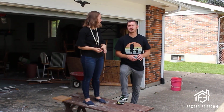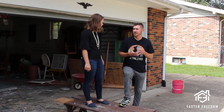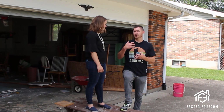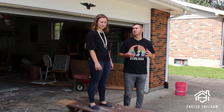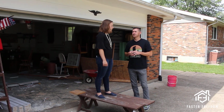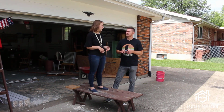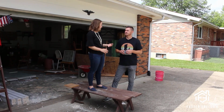Okay, awesome. So it sounds like you guys have a good grasp on what you think you're going to spend, and you're being conservative, but there are definitely things that have changed, like you just said you ended up doing 3.5 huge dumpsters rather than 2. I know you're having a kitchen guy come do the layout and give you prices on cabinets and granite and everything. So there are definitely some unknowns, but you hopefully have projected those in your budget and been as conservative as possible, so you're not coming over budget on every line item. Yep, so we'll know a lot more with the budget probably later this week when I get the cabinets and granite figured out for sure. That'll be a huge item, between that and the concrete.